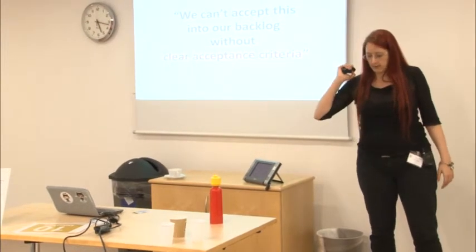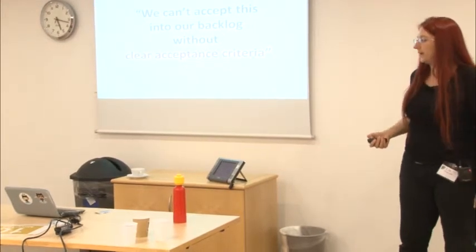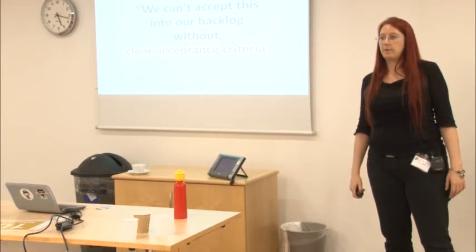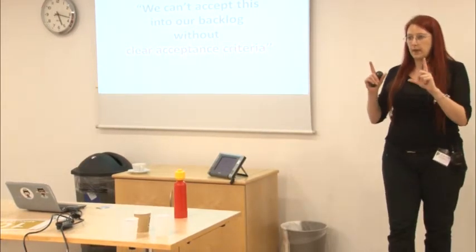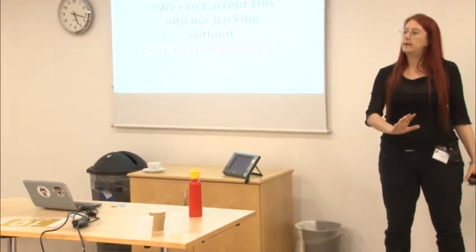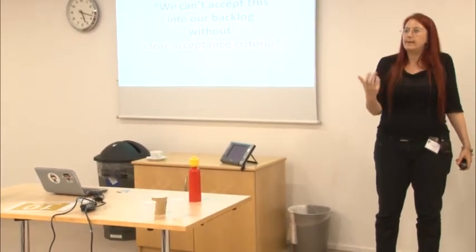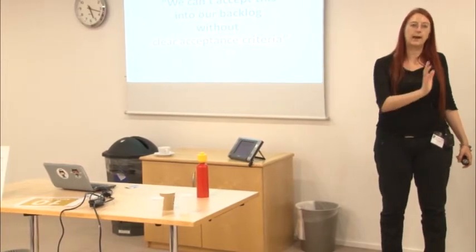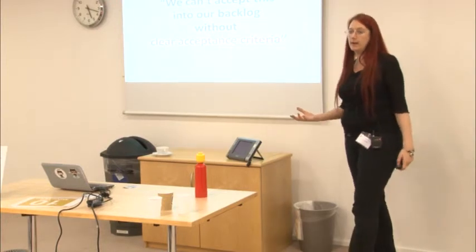So the last thing I really want to get across is this idea that we should not always be looking for clear acceptance criteria for things. I see this on people's explicit process policies so often, particularly with people who are doing BDD, and they push back on the business. They push back against the business's uncertainty, and all it does is end up with the most uncertain work at the end of the project, when you have the least time to respond to the discoveries.